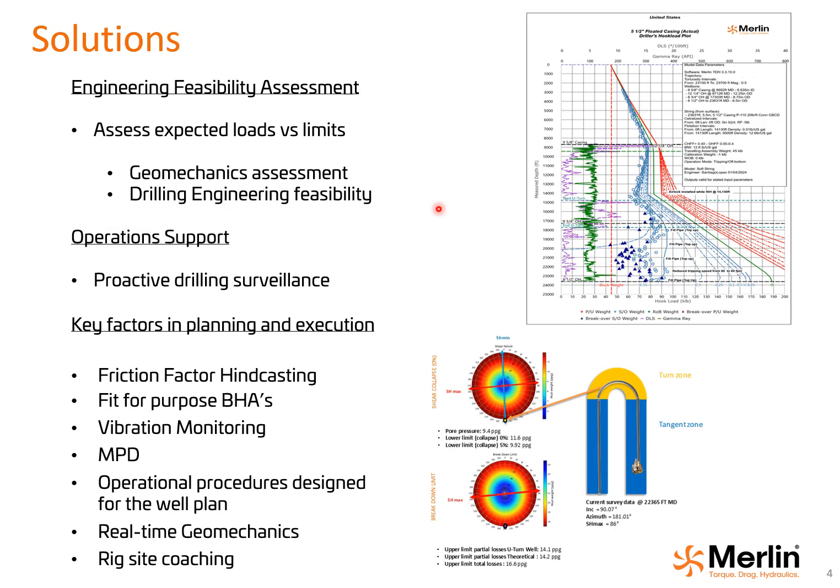There are multiple factors that have to be considered for planning and execution in this well. The first one is doing a proper offset well review. And it's not only based on casing friction factors, it's also checking drilling practices, tripping practices, stuck pipe events, so that can give us an idea of how things need to be focused in the upcoming operations in the horseshoe wells. It will be great if it is possible to have site support over there, just coaching the crews, showing them the best tripping and drilling practices in order to minimize the risk as much as possible.